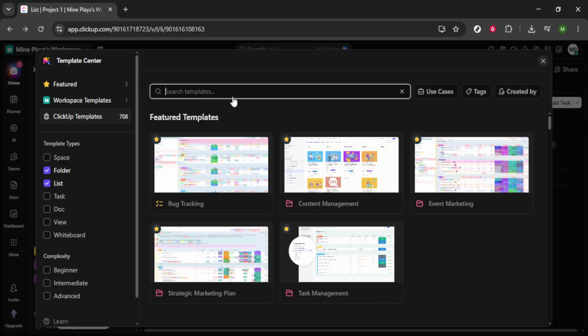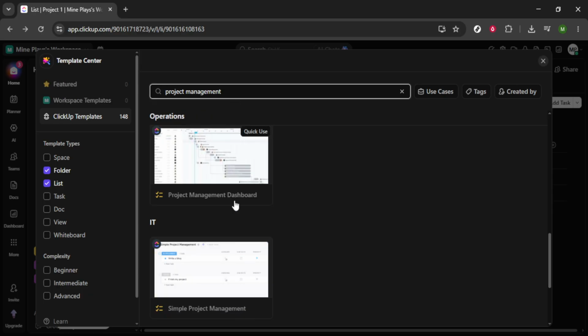You might use terms like discovery, in progress, review, and complete. Feel free to tweak or remove any custom fields that you don't particularly need, but also think about repurposing others for practical things like budgets, deadlines, and task ownership. Setting default assignees and watchers for your common tasks speeds up delegation and makes the whole workflow much smoother.